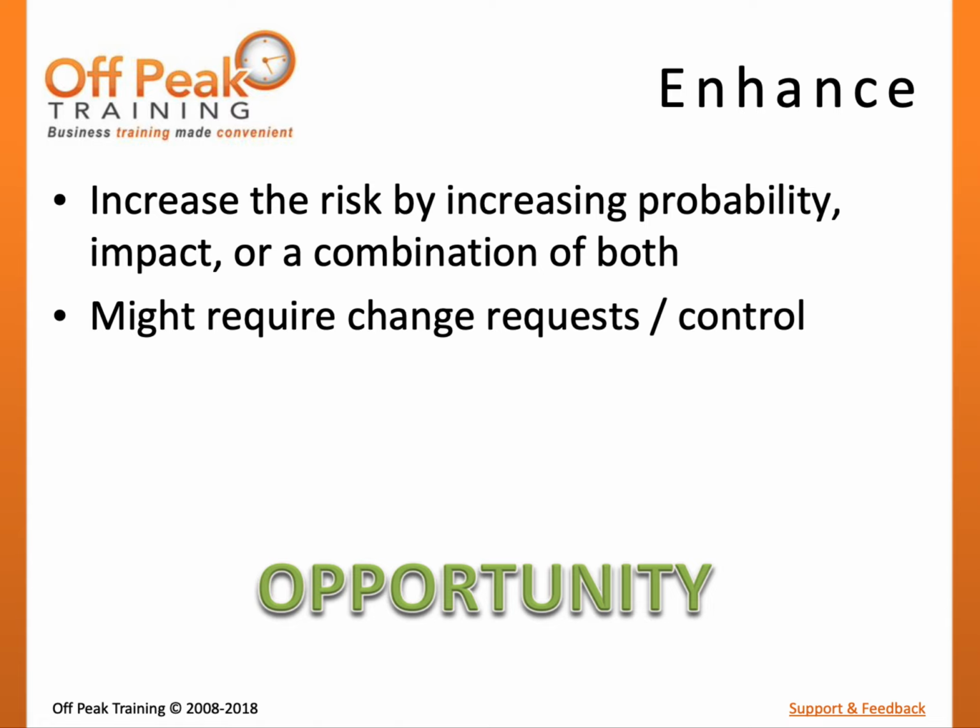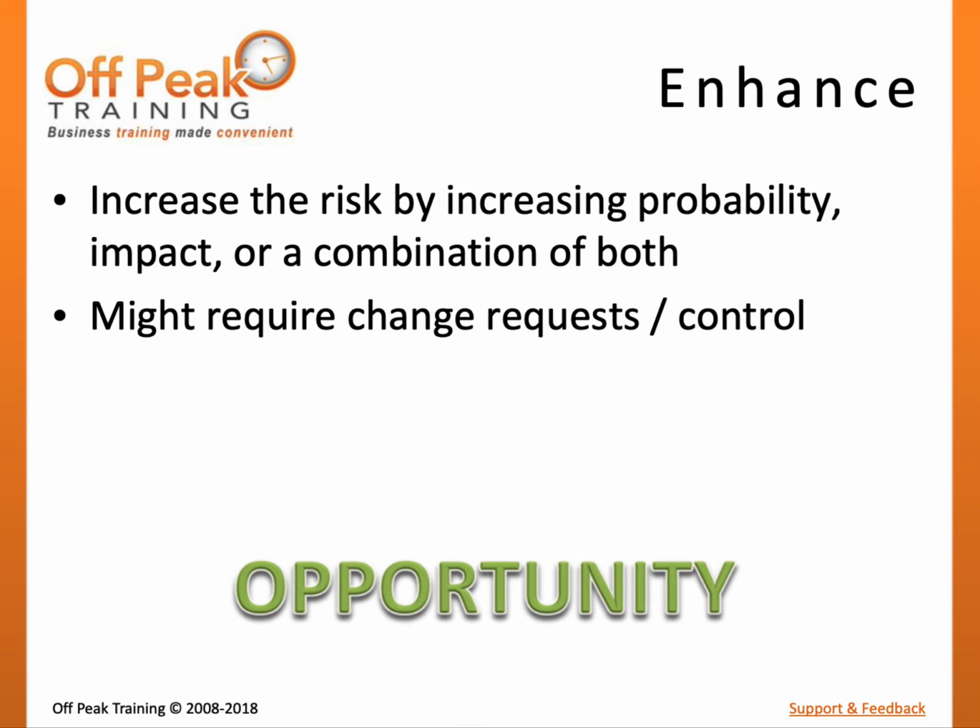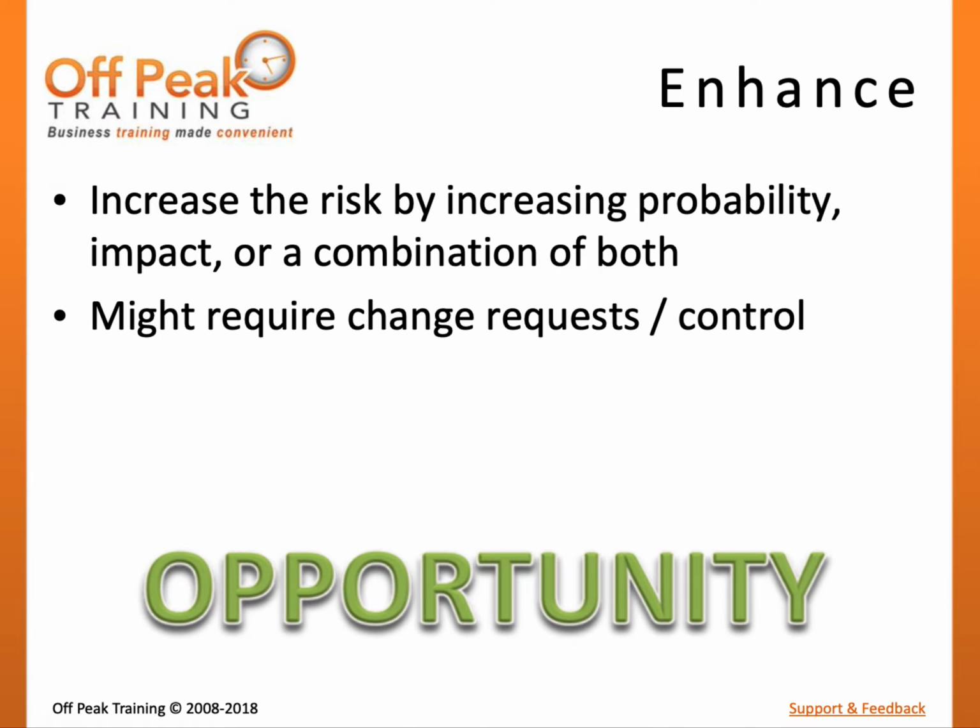For times when an opportunity cannot be 100% exploited, we can enhance an opportunity by increasing its probability of occurrence or increasing its impact. This is effectively the opposite of mitigation, so typically this would also result in a change to scope or another project objective.